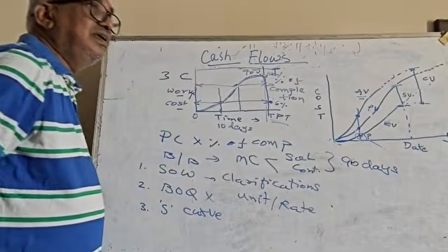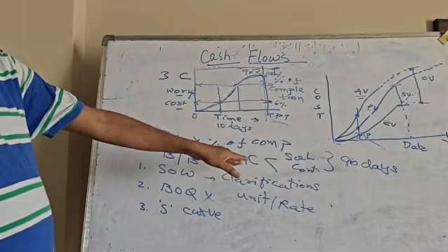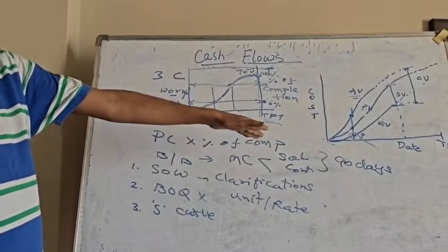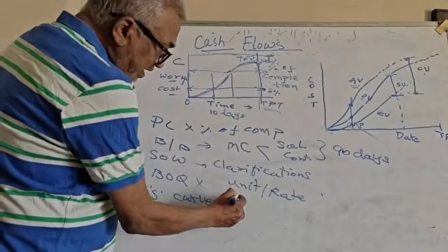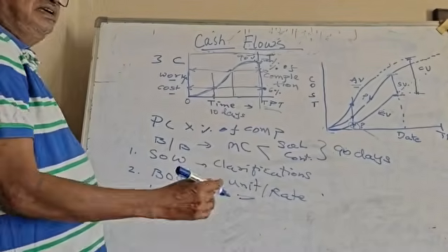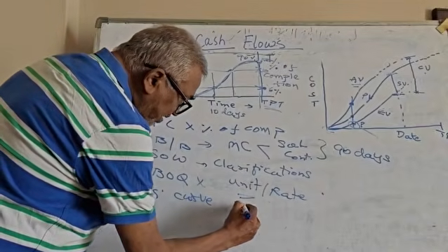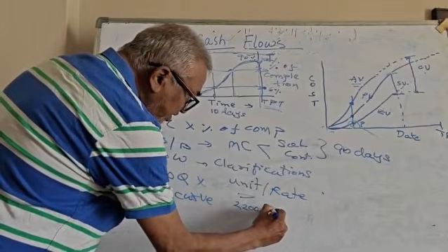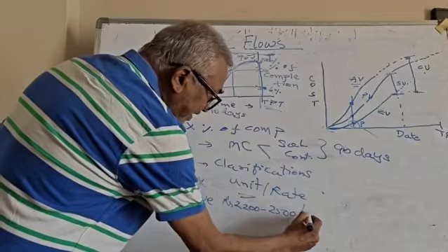Normally what they do, they try to see, suppose in scope of work, what is the amount of construction, suppose maybe 1000 square feet. So for 1000 square feet, they will work out a unit, this much money. Like in India, suppose now it is at the moment 2200 to 2500, say. This is rupees per square feet.